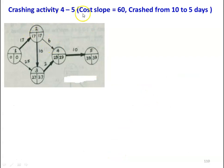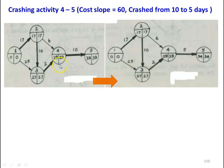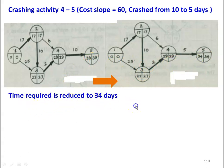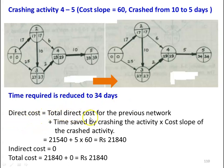Then, crashing activity 4-5 with cost slope 60, from 10 days to 5 days. The project duration is reduced from 39 days to 34 days. Direct cost = 21,540 plus (5 days saved × 60) = 21,840. Since there is no indirect cost, total cost equals 21,840.